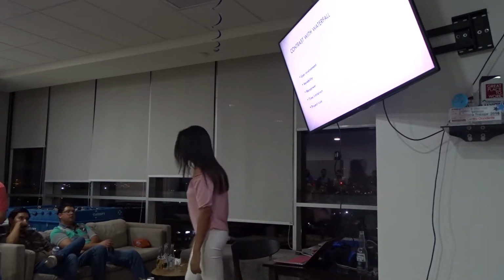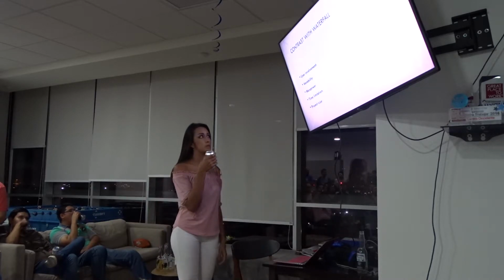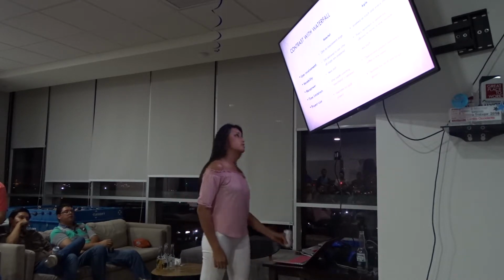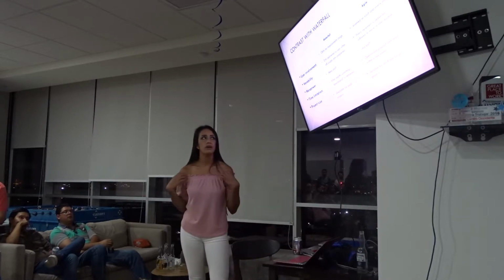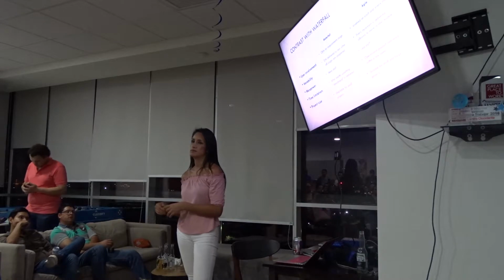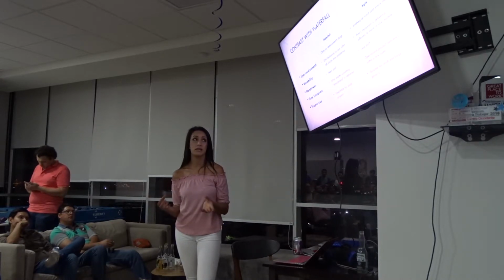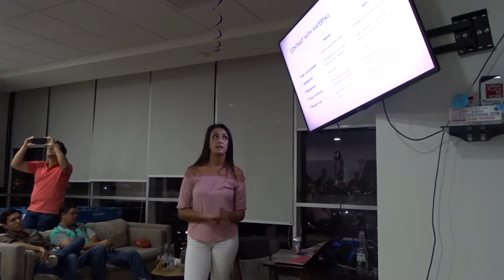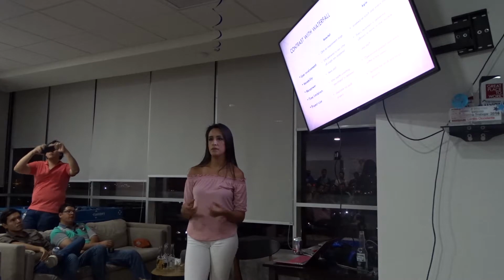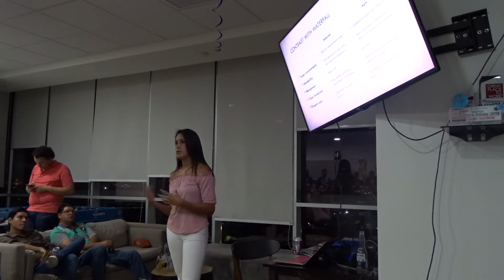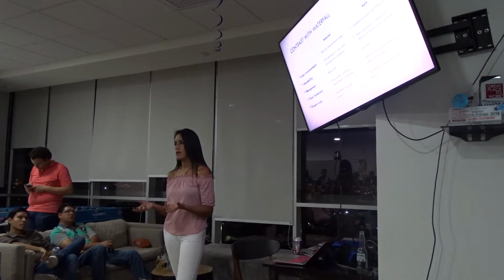Okay, so I'm going to do a little contrast between waterfall and agile using these 5 characteristics. First of all, for user involvement, we know that in waterfall the user only participates during the requirements session. After that, we never see them until the end, when we give them all the code integration, all the product. That's when we see the user again. But normally it's only in the first stage of requirements, and then he disappears. In agile, we see him in each stage. We can be talking or getting together with the user face to face during the design, during the requirements, during development, and you're giving him little chunks of what you're building, so he can check whether it's right or not, and you can make those changes quickly.